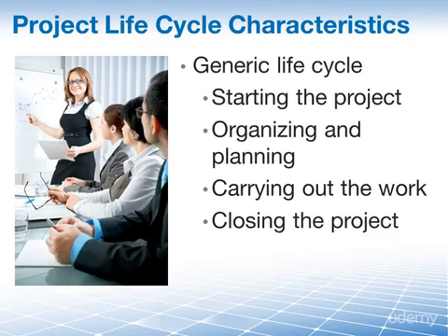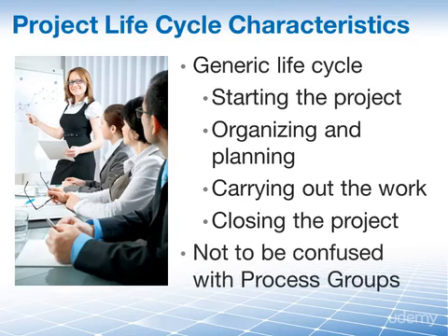And when you look at the PMBOK guide, you think, well, this looks almost like the process groups. Well, this is not to be confused with the process groups, because the processes in a process group consist of activities that may be performed within each phase of a project, as well as the project as a whole. Also, the project life cycle is independent from the life cycle of the product that is produced by your project. The project can and should, however, take the current life cycle phase of the product into consideration.